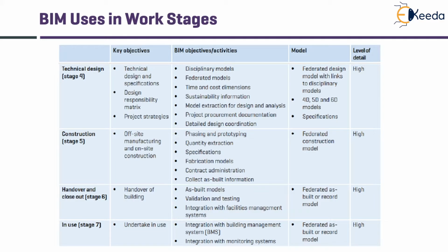In the construction stage, the finalized BIM model is used for off-site manufacturing as well as on-site construction monitoring. In handing over stage, the BIM model is updated to incorporate any as-built changes. Validation and testing is done. The level of detail maintained is high.